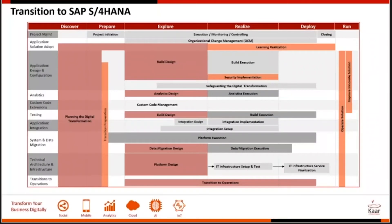The work streams are on the Y-axis and the phases on the X-axis. Each cell within this matrix represents an activity that has to be done in the project as part of a certain work stream within a particular project phase. The work stream is important because it primarily tells you the kind of resources who are going to play a part. If we can effectively put the entire list of conversion tasks into the right cell in the matrix, then the conversion is already well begun.